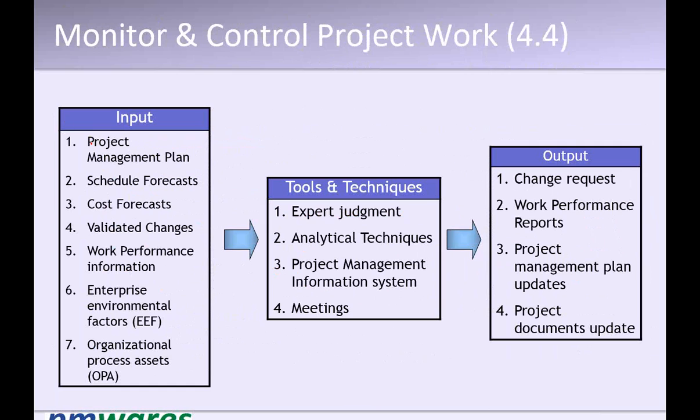Right, so you have the project management plan, which provides the plan part. You have work performance information, which is the information you collected and refined. So work performance information means refined data from which you can make out some meaning. And then schedule forecast and cost forecast, because if there is a change in execution, your schedule and cost will change. So all three together mean the changed, modified, current plan.